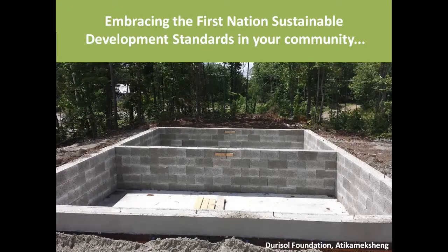I think the company is located a distance away in southern Ontario, so I think they were having difficulties getting the labor up to address the assembly of the units.